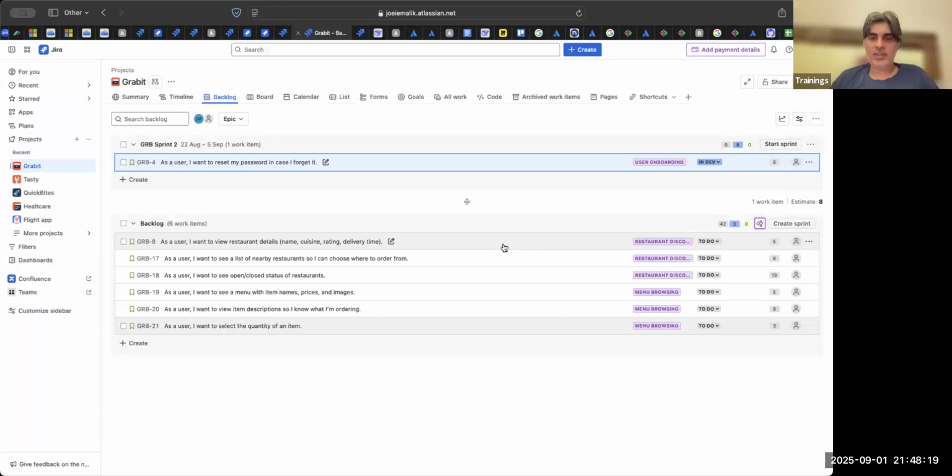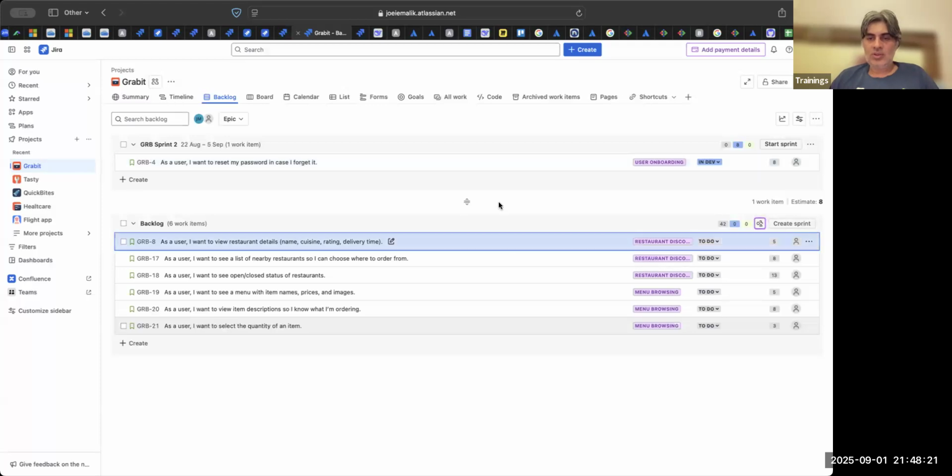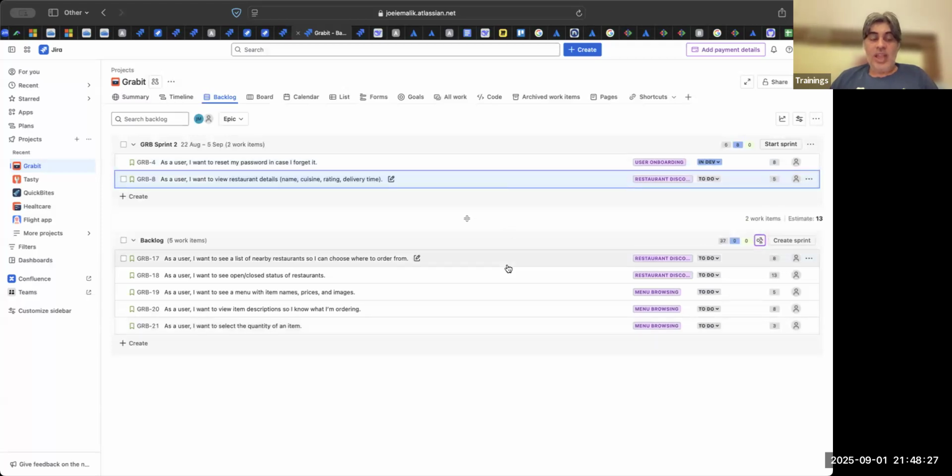This is only 2 sprints. So one developer says, I'm going to pick this story. I'm fine with this. I'll be able to do this. In the first sprint, we did not know any story points, no velocity, no concept. We only took 4 stories based on the gut feel of our developers and testers. In their judgment, they said, okay, 1 work item to each person, we will be able to complete it. They were able to do 3 stories. One was a spillover where they missed finding the API.